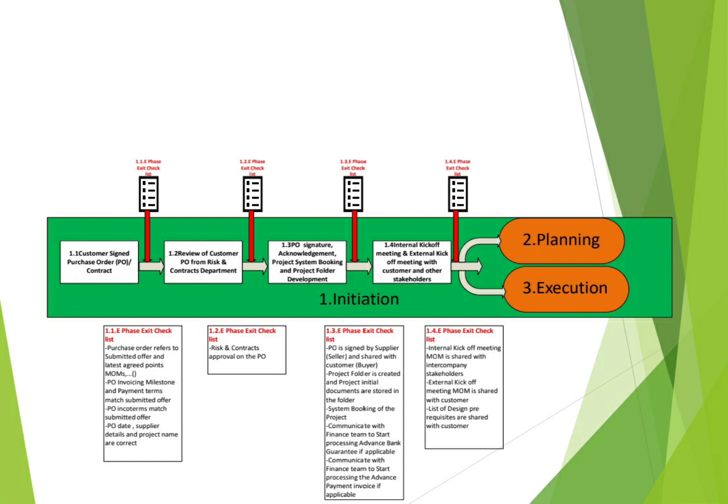finance team. Next, you need to proceed with the internal kickoff meeting and the external kickoff meeting. Internal means internal to your company, and external means with your customer. So in this meeting, first the internal, you need to gather all departments. You need to include the finance team, the quality team, the technical team. If you have a risk team also, you need to include them.